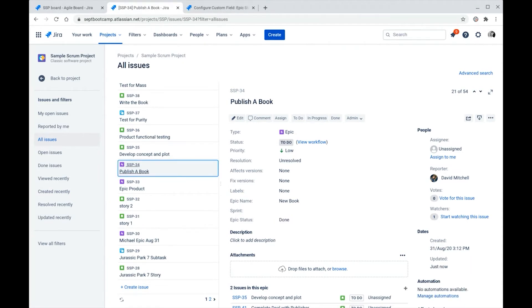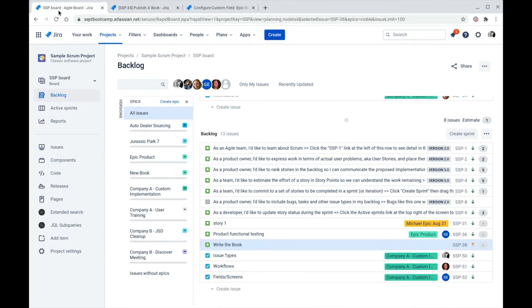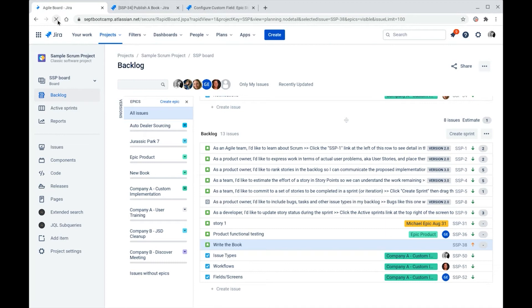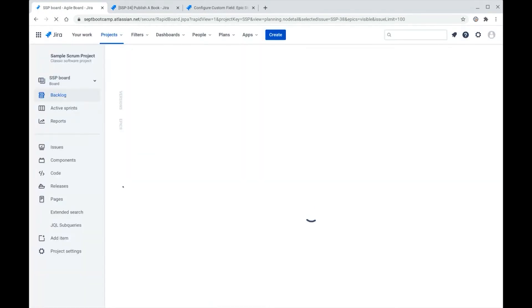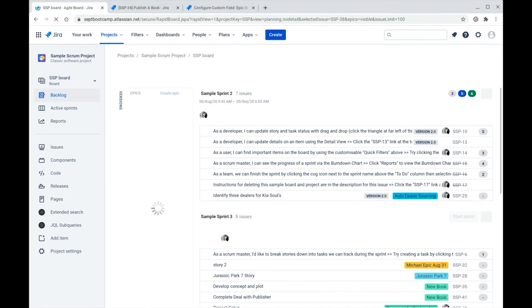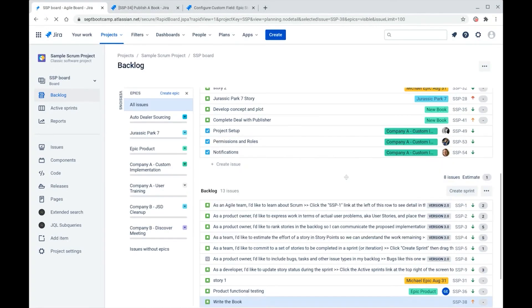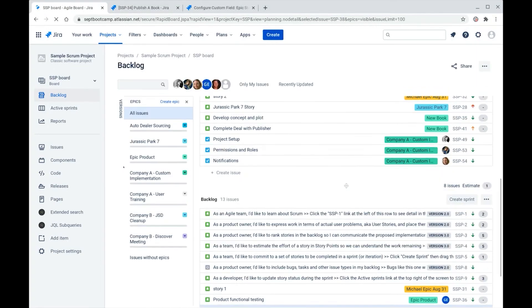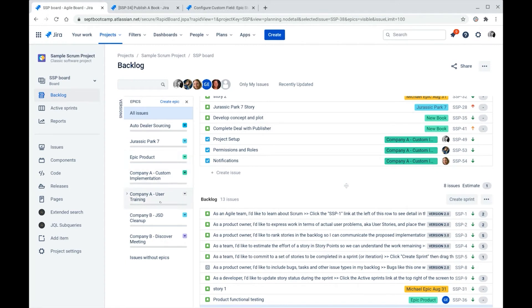The first big change is that the epic will disappear from the epic panel. So let's go over to our epic panel here on our scrum board. I'm going to refresh the screen now that this epic status has been changed to done. And as it refreshes, we now see that the epic titled New Book disappears from this panel.